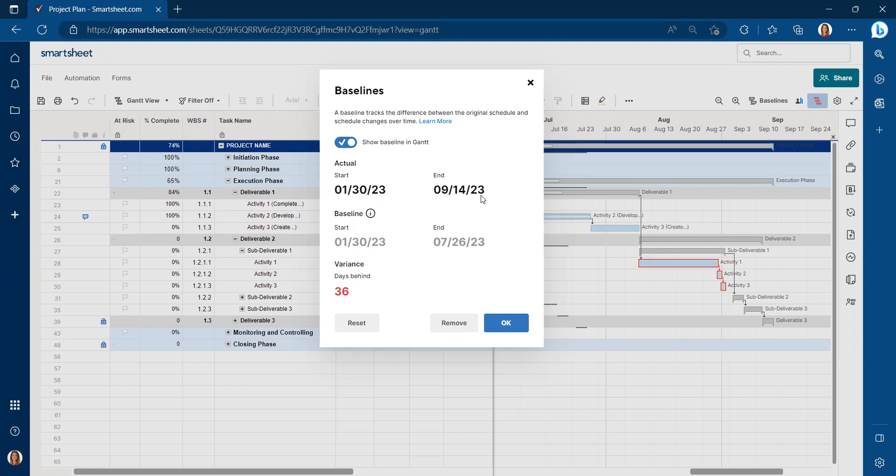In MS Project, if you're familiar with that project management tool, you can have baseline one, baseline two, baseline three, and insert columns to measure against different baselines.